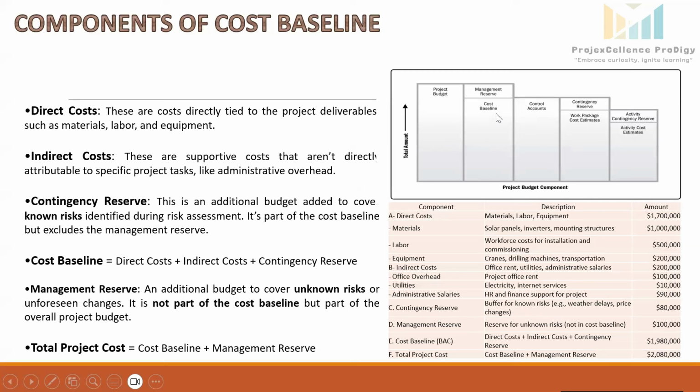Cost baseline. This is the approved version of the project budget, excluding the management reserve. It serves as the budget which is used to measure the project performance, and it is the composition of the sum of the control accounts, and contingency reserve.